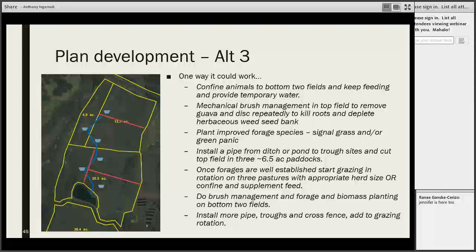Other considerations that we'd want to include in the discussions with the client would be time needed for engineering, like Drew brought up the other day. Time needed for making sure we get the seed to arrive in time before the client needs to plant. We need to make sure that the client's aware of these kind of things so that he can plan accordingly.